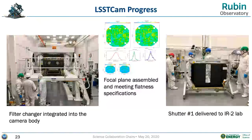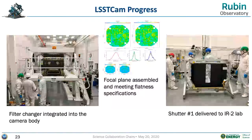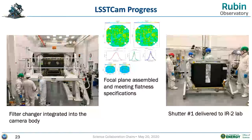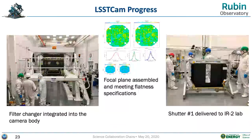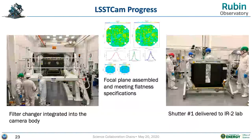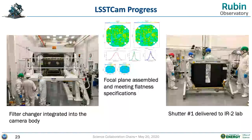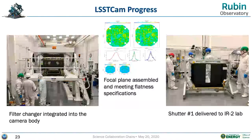The left panel shows the integration of the filter exchange mechanism into the camera main body — that's a big deal because the filter exchange mechanism was built and developed at IN2P3 in France, tested and accepted there, then shipped, delivered, and re-verified at SLAC. It's now ready as a first-article piece of the camera.